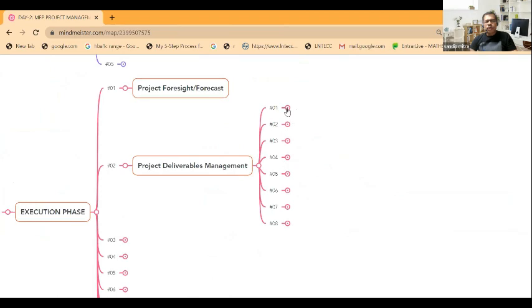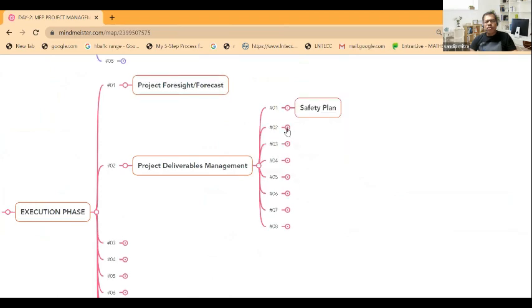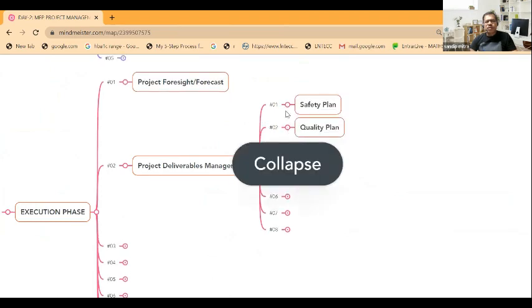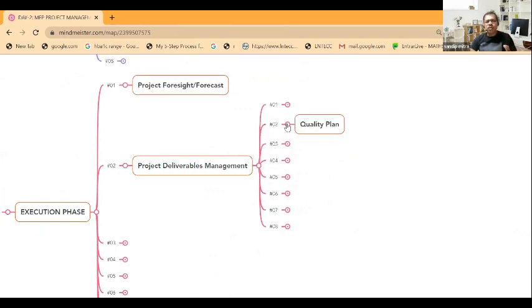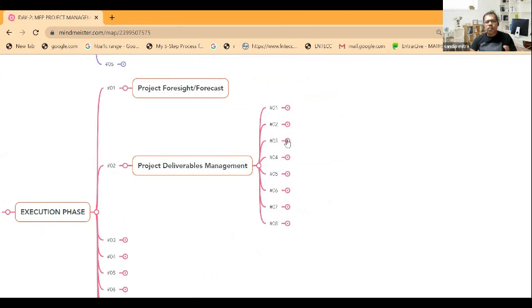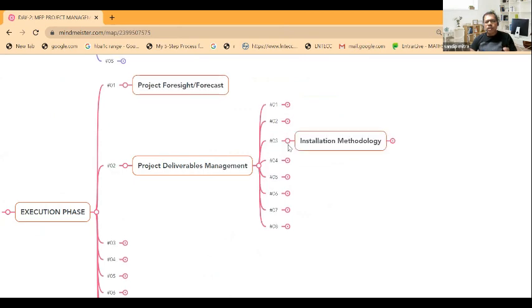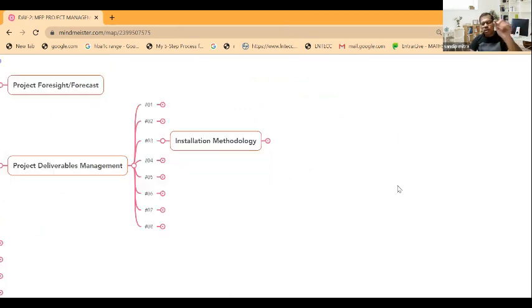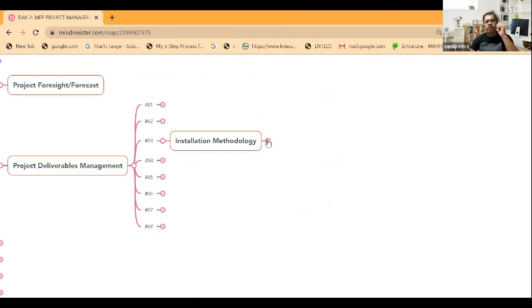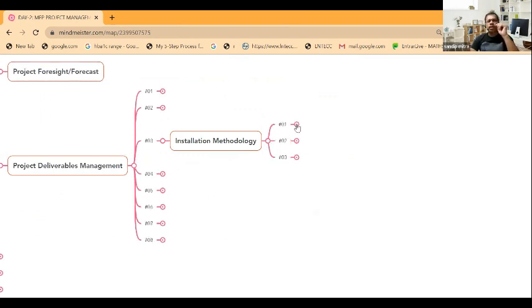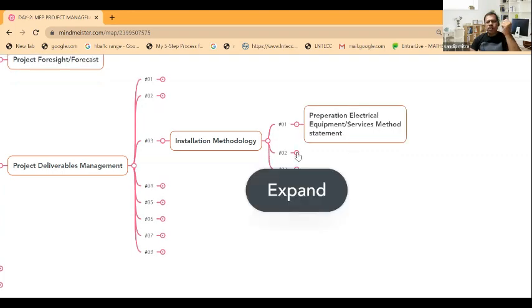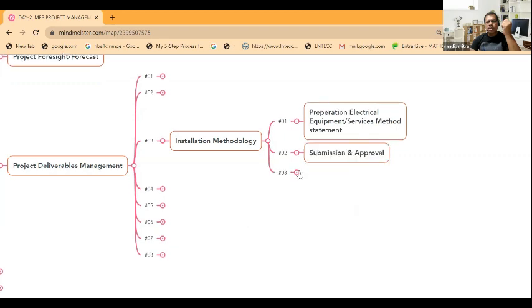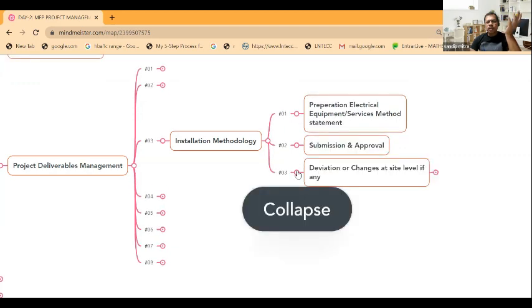These are the documents that will come into the picture: safety plan you need to submit, quality plan - these are deliverables documents. Then installation methodology for different packages and equipment wise. Inspection methodology or method statements need to be prepared and submitted, like electrical equipment or services methodology. You have to prepare and submit and take approval from the client.